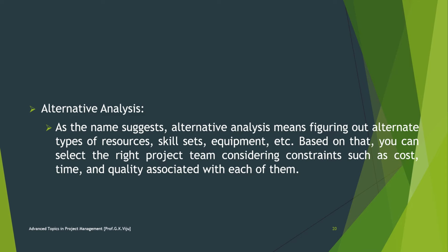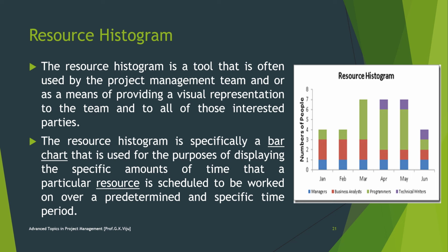Then comes alternative analysis, considering several different options of how you assign resources. This includes varying the number of resources as well as the kind of resources you use. Many times there is more than one way to accomplish an activity, and alternative analysis helps decide among the possibilities.